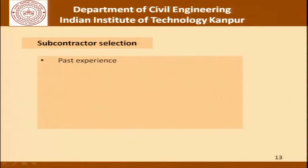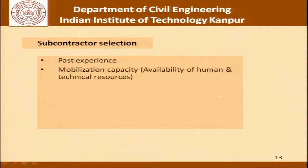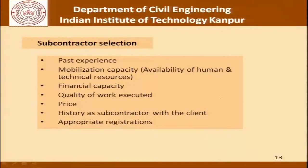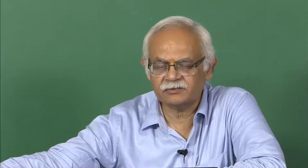As far as subcontractor selection is concerned, we must look at past experience, mobilization capacity in terms of available human and technical resources, financial capacity, quality of work executed in the past, the price quoted, history as subcontractor with the client, and appropriate registrations. In a manner of speaking, the exercise a client carries out in identifying a contractor is similar to the exercise a contractor should carry out when identifying subcontractors, except that the contractor perhaps has a lot more leeway in selection.